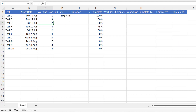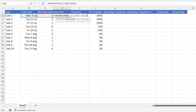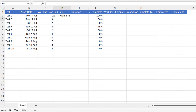It ends on Tuesday the 5th of July. Depending on how you want to see this, that could be a two-day duration. If you're happy with that you can leave the formula as is, but I'm going to subtract one from that result so that a one-day task ends on the same day it starts.